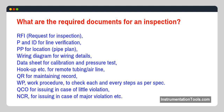What are the required documents for an inspection? RFI (request for inspection), P&ID for line verification, PP for location (pipe plan), wiring diagram for wiring details, data sheet for calibration and pressure test, hookup, remote tubing airline, QR for maintaining records, WP (work procedure) to check each and every step as per spec, QCO for issuing in case of a minor violation, NCR for issuing in case of a major violation, etc.